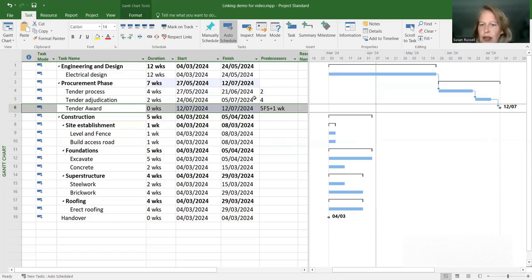And we would carry on exactly as we have been going until the end, and you'll eventually find a finish date. And that finish date would then be submitted to the client and they would approve, hopefully. If not, you'd have to go in and maybe look for ways so that you can shorten the schedule. And then if they approve, you would baseline the schedule.